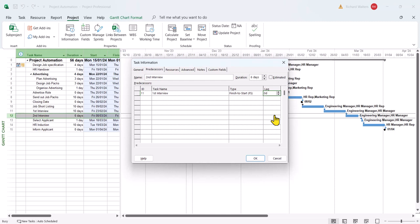We'll try both with a two day lag first. So two. And what will happen with this two day lag? It'll change the finish date. It'll change the duration of the project from 56 days to 58 days.